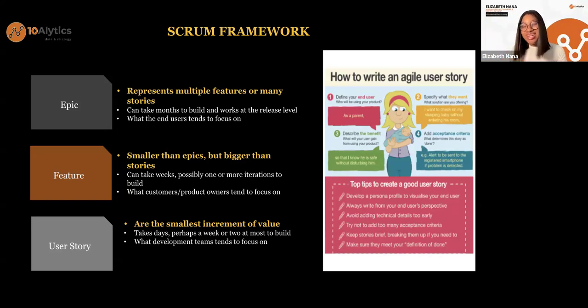Now, user stories are the smallest increment of value. User stories could take days or perhaps one or two weeks to build at most, right? And that's what the development team tends to focus on. An example of a user story in this smart kitchen could be the installation of the tiles. The contractors, the people that are building this kitchen, are focusing on the minute details, the things that they need to do: installing the tiles, installing the cabinet, installing the cabinet handles, spraying the cabinet to your desired color using spray paint, and all of that.